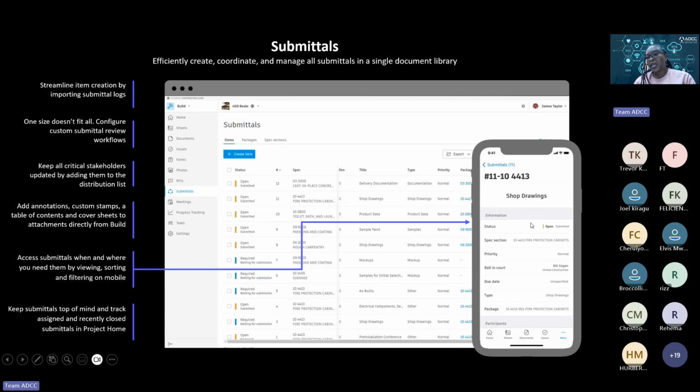item. There is an activity log or information log that shows the history of the submittal request, especially with that workflow that we had. So if the contractor has probably already submitted something, then it's possible for it to show that. And then if currently the PM is the one who's supposed to be reviewing on the architect, then it will show that when you look at the application and you're looking at the ball in court space. Then for items that probably do not have a due date, then you can specify